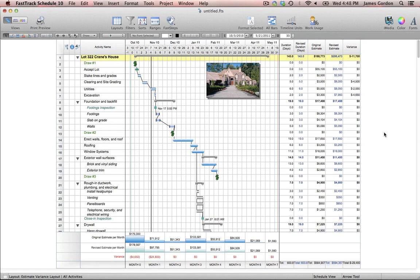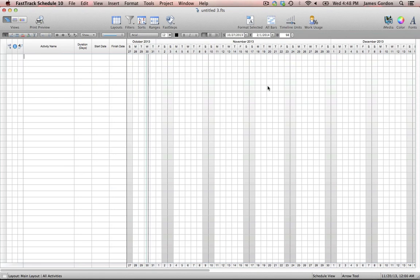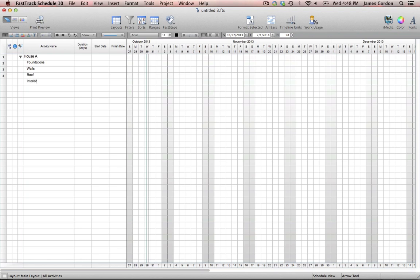So those are some of the main features of FastTrack as well as our three and a half views. Now let's go ahead and flip to a blank schedule and go through some of the fundamentals of building out a schedule from scratch. For this example, we'll use the example of building a house. We'll call our overall project name House A. Then go down to the next row — all we have to do is press the Enter or Return key. To indent these tasks and put all the tasks within that overall project name, all we have to do is press the Tab key or use these handy arrows in our toolbar to indent the task and create a new outline level. So now let's set up a quick task list: foundations, walls, roof, and interior. Then let's create some subtasks within that interior phase by pressing the Tab button once again, and we can put in electrical and plumbing.